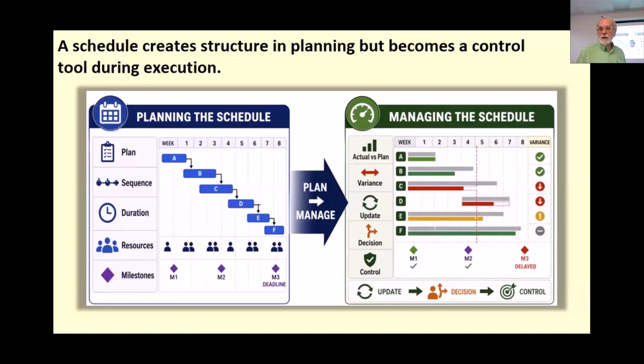And once we begin execution, the schedule takes on a different role. It's not only a forecast for intended work, which is essentially what the plan is until we start doing it. It's a forecast into the future of what work we're going to do. It becomes a tool for tracking actual progress, comparing actual performance to the plan, identifying slippage, and deciding whether corrective